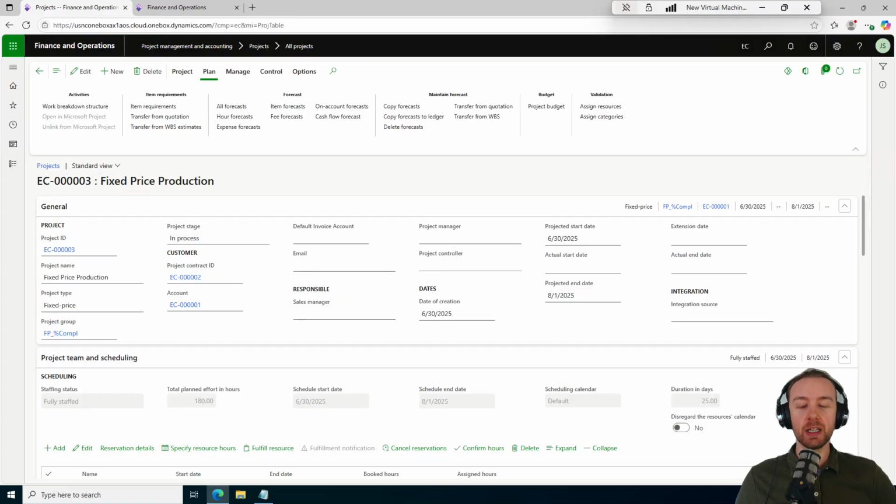using for invoicing. In particular, today we're going to be focusing on a fixed price billing rule so that we can bill on percentage of completion of the project itself. That percentage of completion on the project is going to be driven by actual timesheet entries against the project that we'll see later on and how that works with the work breakdown structure.